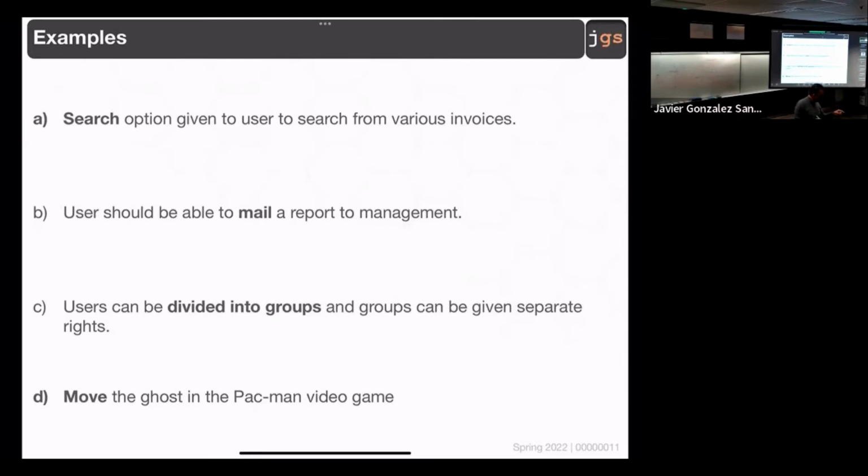If you need to implement that functionality, how much time do you need to implement that? How much time do you need to put that in a software? Do you need days or hours? How much time do you need to allow the system to ask for the subject of the email? Hours or days? And it's like, really? You want me to ask for the subject of the email? That basically is to put a text field, period. And maybe a button to send, click send. All those things are part of the graphical user interface, and I can create that graphical user interface in a couple of hours. That is not a requirement.